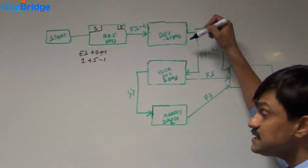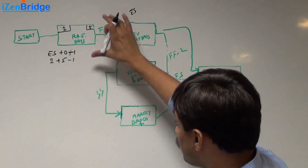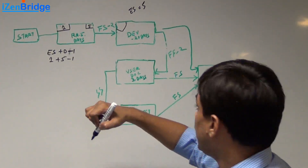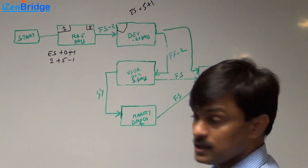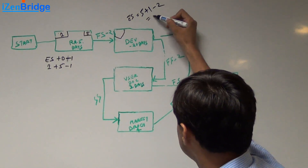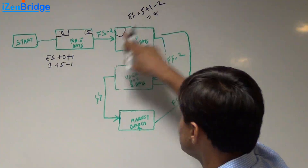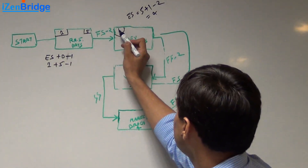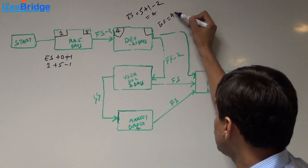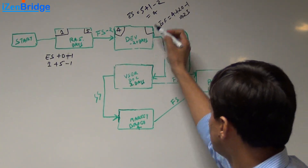Since we are following the FS relationship, the early start of development is based on the maximum of its predecessors. Here there is only one predecessor, so it's day 5 plus 1 for the next day. Since there is a lead of 2 days, we subtract 2, giving an early start of day 4. Development takes 20 days, so the early finish is 4 plus 20 minus 1, which equals 23.